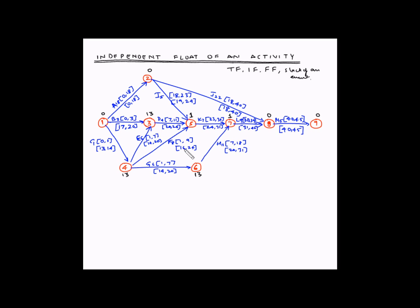The total float available for activity F is 16 minus 1, which is 15 days. Out of these 15 days, one day — which is the head slack — is the interfering float, and 15 minus 1 is the free float available for activity F. If we use the interfering float for activity F, the float of activity K is impacted. However, if we use the free float for activity F, there is no impact on the float of activity K.